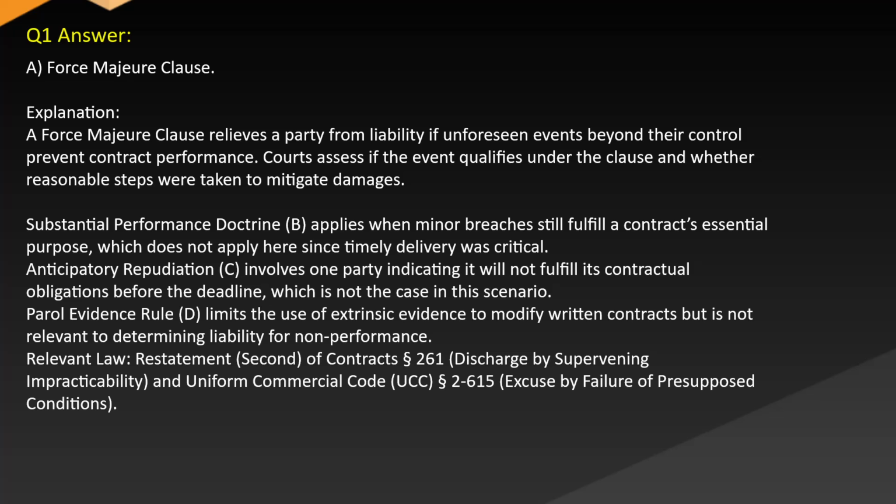Answer A. Force majeure clause. Explanation. A force majeure clause relieves a party from liability if unforeseen events beyond their control prevent contract performance. Courts assess if the event qualifies under the clause and whether reasonable steps were taken to mitigate damages.